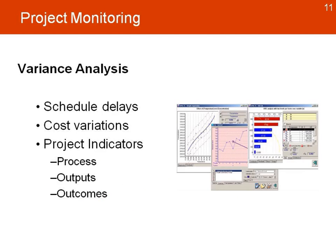Variance analysis is the idea that we need to look at changes — both in the schedule, if there are any delays, and variations in cost that could be caused by changes in prices or the cost of goods over time. We also look at key project indicators to see their variances, examining our process, outputs, and outcomes.